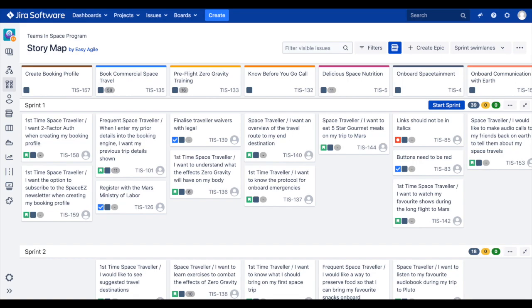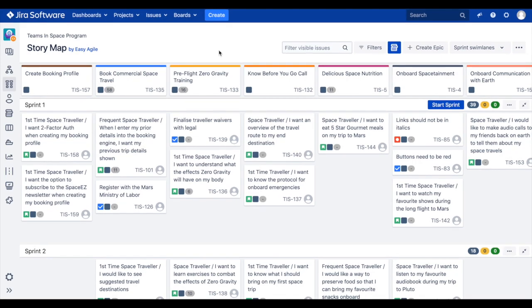All of the stories you see on your user story map are those that have been linked to an epic. But what about those issues scheduled in your sprints or versions or simply sitting unscheduled in your backlog that have not yet been linked to an epic? Issues not linked to an epic from your agile board live in the issues without epics panel.